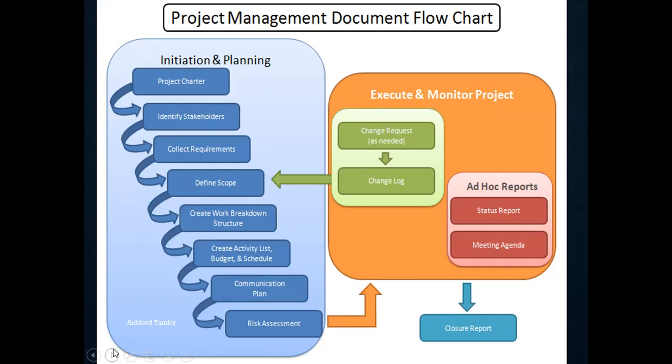And you also need to ensure that when you've done this, you would have had a risk assessment done on each of the major phases within your project, right? Notice I'm not saying that you're doing a risk assessment on your entire project, but you need to do that risk assessment on individual activities and tasks, right? When you would have done that in the initiation, the blue box that we have here, you are now able to go on to the execution and the monitoring aspect, right?